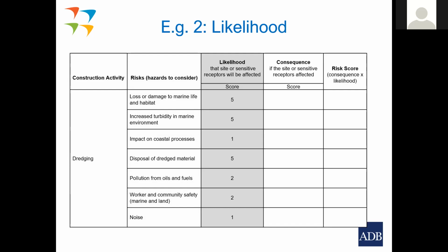Impact on coastal processes. Well, I've given it a 1 here, and the reason is that in the previous environmental assessment for the South Parade Dredge Channel, there was hydrodynamic modelling done for that channel. And the hydrodynamic modelling showed that the impact of that new dredge channel would not have any significant impact on coastal processes. So that's why it's given a 1. That's the only reason, because that work was previously done. And we know that this little extra bit of dredging is most unlikely to change that assessment or outcome.